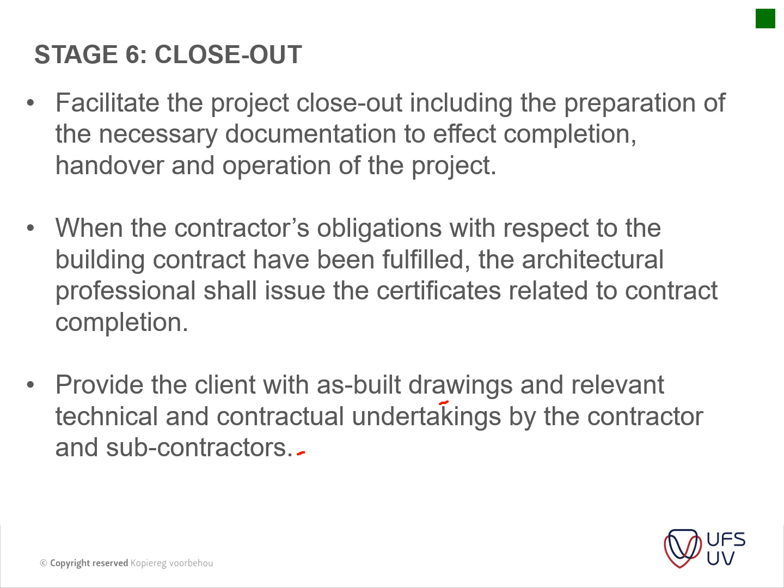If it's a public project for government, you would have an occupation certificate, like for instance your health and safety, or your health inspector will come and inspect your building. They will ask, did the structural engineer sign off on all the SABS documentation, is the electrical COC in place, etc., etc.